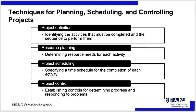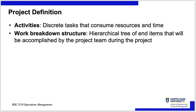We want to identify the activities and tasks that must be completed and the sequence in which they must be done. When you're building a nuclear submarine, you don't build the hull and then try to put the nuclear reactor inside — you half-build the hull and put everything inside first. Resource planning involves determining how much resource you need for each activity in terms of budget and people. Scheduling means having a time schedule for completion of each activity, and then controlling ensures all parts are being completed on time.